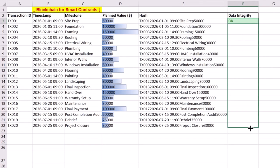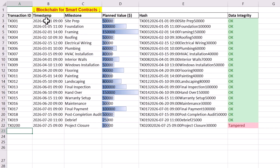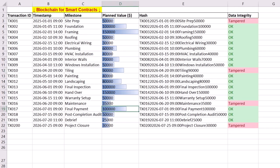Any tampering with transaction ID, timestamp, milestone, or planned value will change the hash and a warning is generated.